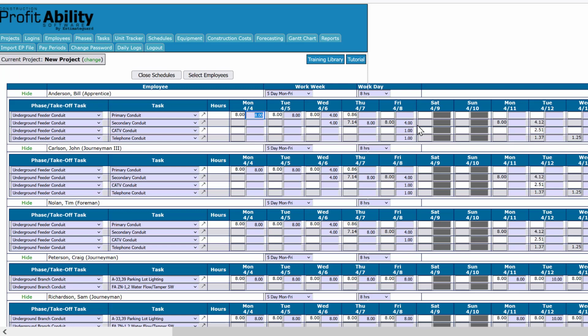And what you're going to find out is when you do that, things just get done on time. The majority of the time, things get done on time. Now, there are situations where they'll encounter things in the field that weren't predictable. And it's going to make them go over on their hours, and that's excusable, and we'll capture that in our daily log in case there's any change orders there that we could possibly pursue. And so we have documentation of what happened when we close out our project and we want to know why things happened the way they did. A lot of that information gets captured here, but a lot also should get captured in the daily log, okay?